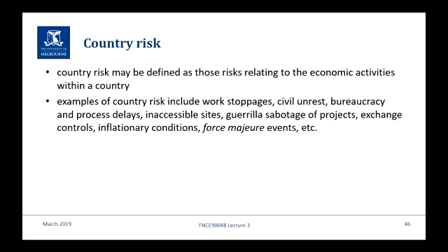In fact, our seismic lines kept being cut. Every time we were laying seismic lines, some guys were jumping over the fence overnight and cutting them, just so that labourers had more work. Every time, so we just had to relay the same. Yeah. So sabotage, exchange controls, inflationary conditions, force majeure events. These all arise from being in the country.